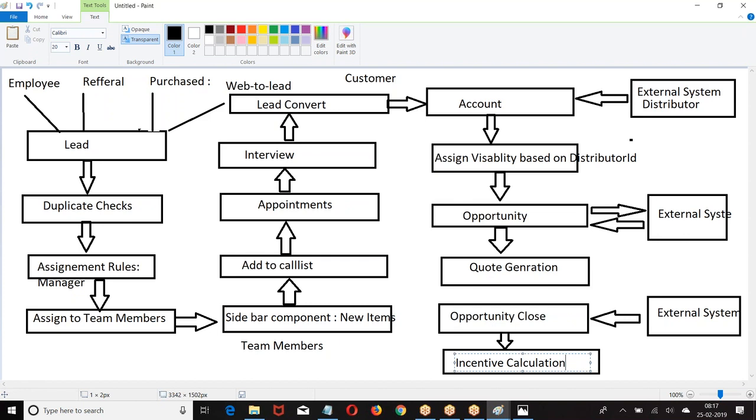For every task we give maybe 1 point, 2 points or 3 points, depending upon the complexity. Then what we follow is that for every consultant, a weekly 3-point task is assigned. The 3 points may be a single task or a combination of 2 tasks, depending. The weekly load for every consultant is 3 points, and a week is 5 days. When I say sprint, we consider 1 month as 1 sprint, basically 4 weeks as 1 sprint.